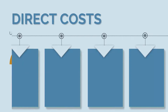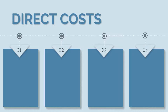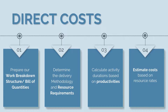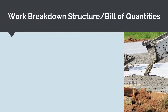The process we follow to calculate direct costs is as follows. First, we need to prepare our work breakdown structure and bill of quantities. Next, for each activity in our WBS, we need to understand exactly how we are going to complete that construction activity and what resources are required. Then, based on productivity rates and the quantum of work from our bill of quantities, we can estimate the activity duration. And from our base resource costs, we can then calculate our resource rates. The first step is to prepare our work breakdown structure and bill of quantities.